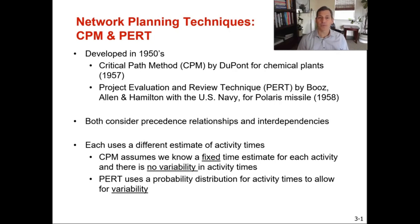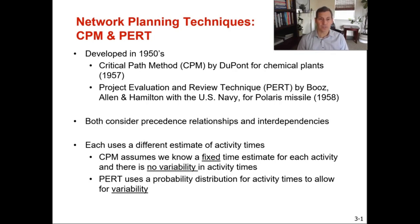Within that project there are going to be various activities that get us to that 16-week total time. Step 1 might be 3 weeks, step 2 might be 2 weeks, and with CPM we assume there's no variability — we assume they're just going to hit exactly what we forecasted: three weeks for the first one and two weeks for the next one. So no variability.